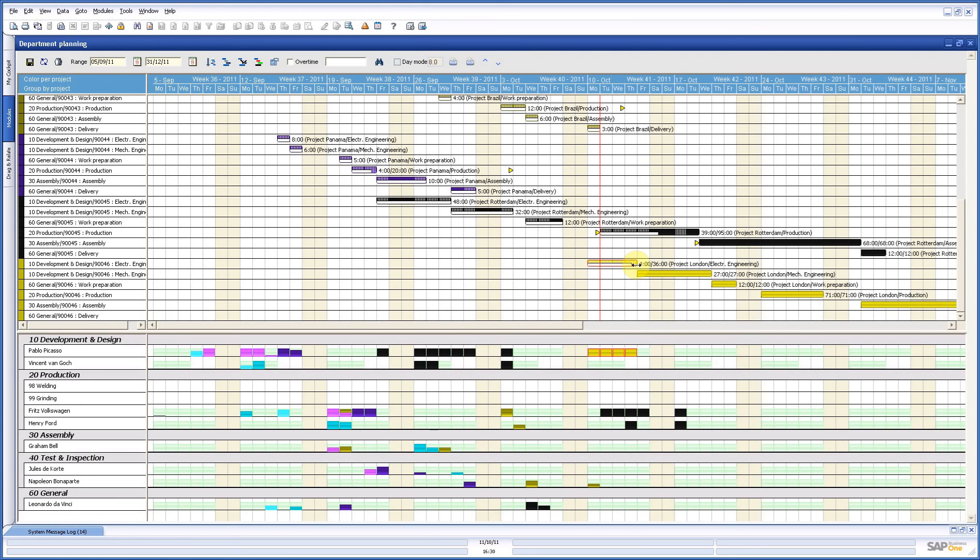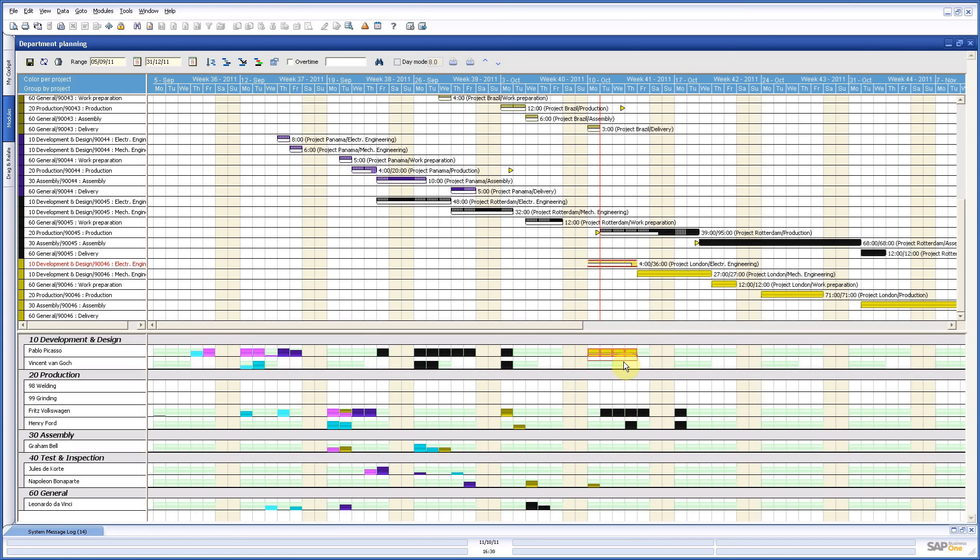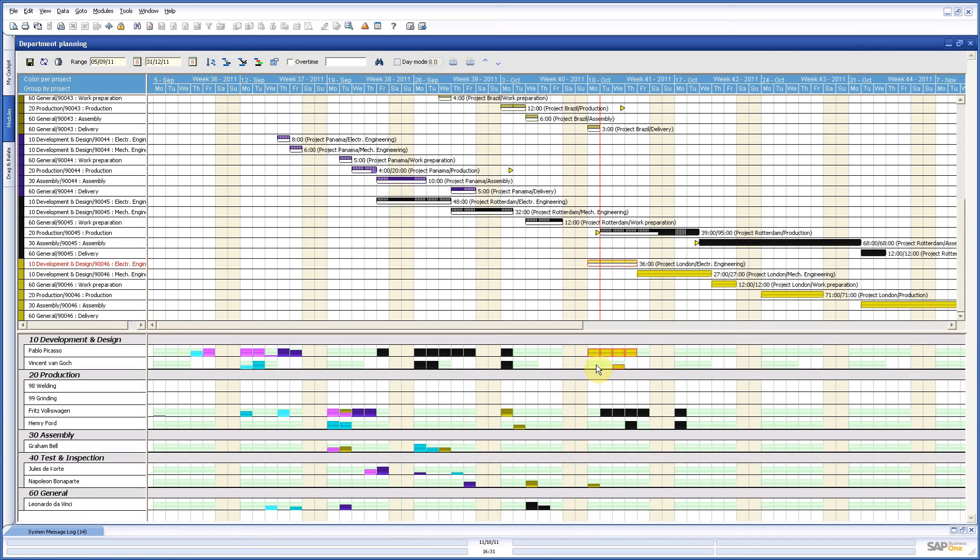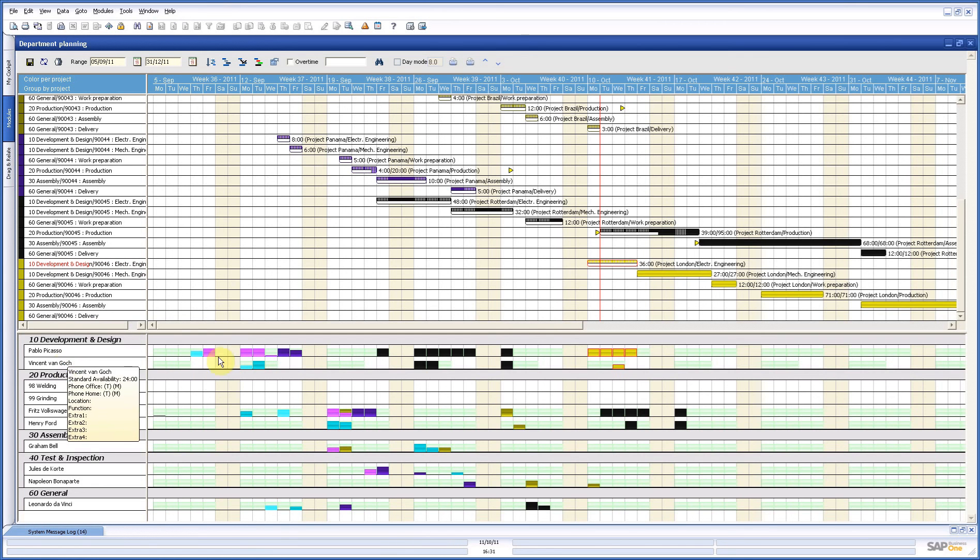That's what this thing is showing. So, I can say, okay, I pick up these four hours. And I put them here with Vincent. With Vincent, you also see here that he has two white spaces. That's because in his calendar it says he only works three days of eight hours, which is the 24 hours of capacity you have here.